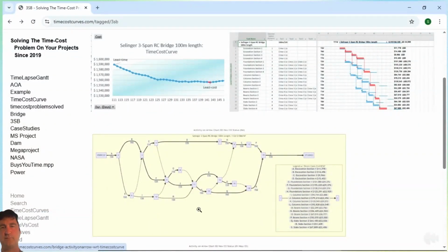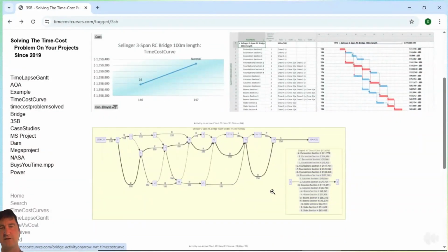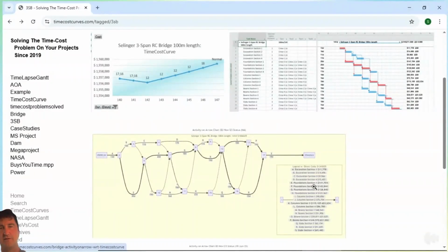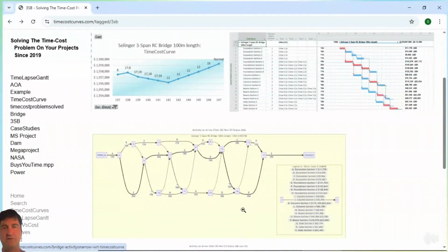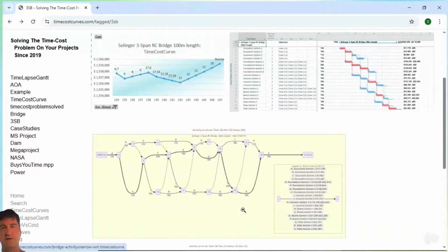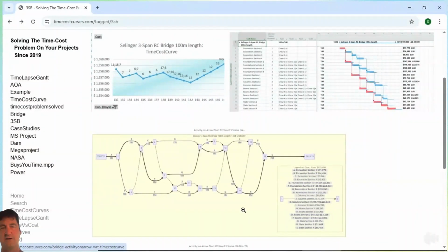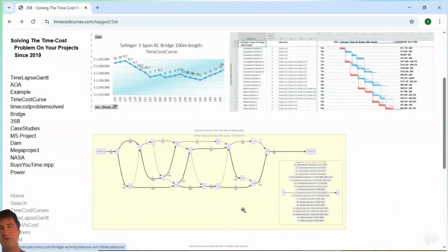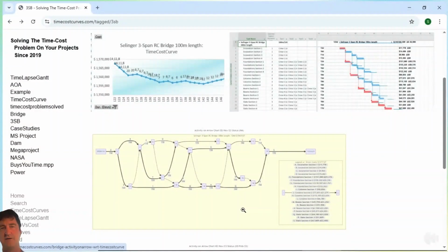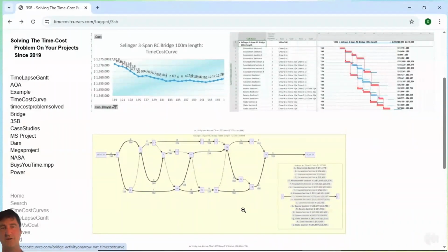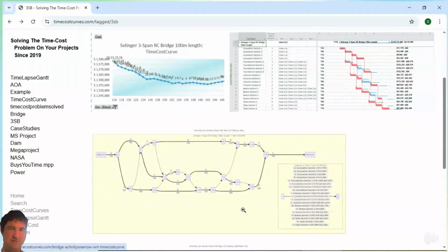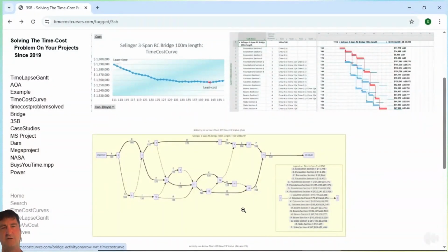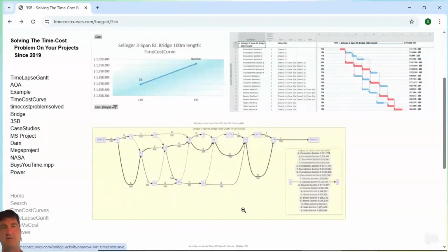Okay, here we have the legend, which is the 19 activities, and the bold, again, is a critical path. And what we're doing, and you'll see the movement of it, is we are compressing this network. So if you had activities which aren't tied in properly, then compression of the network will become invalid. And that's why it's essential to tie them all together in a valid way so that you can compress the network and get correct results from doing that.